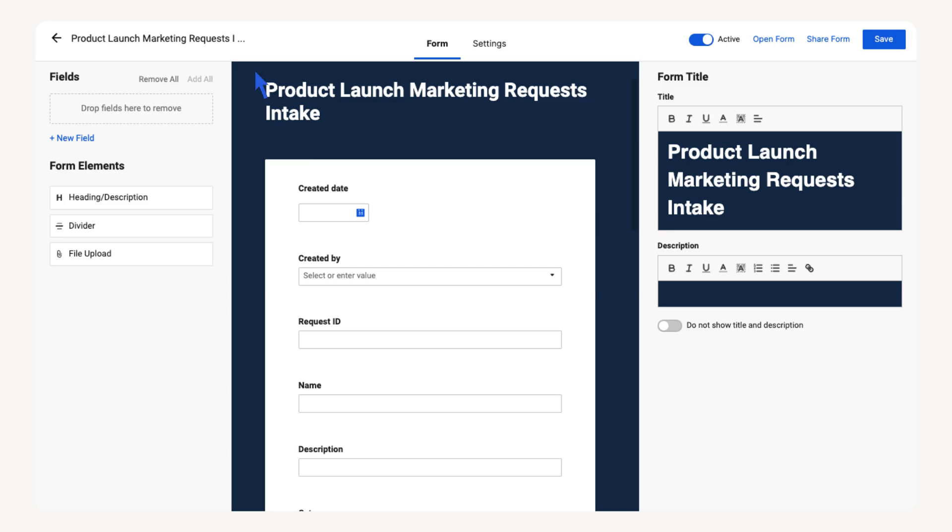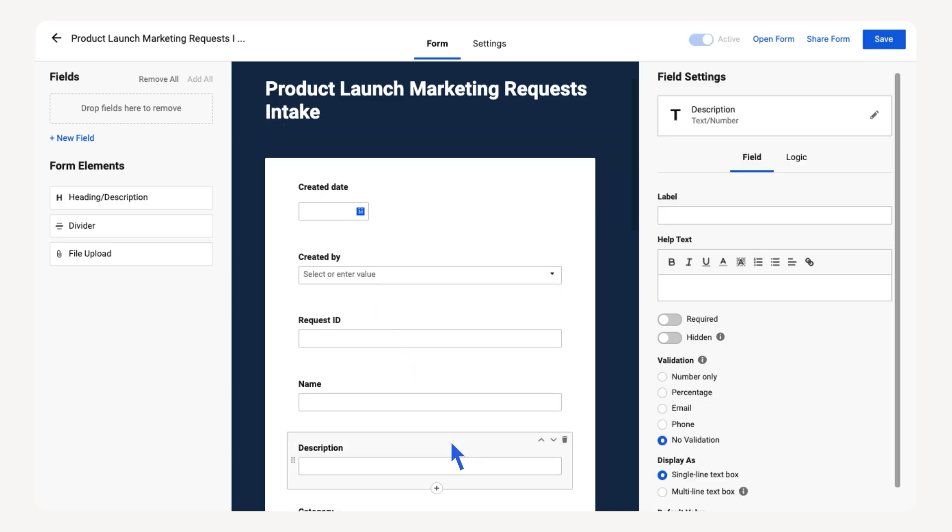Let's make the description field a required field. Select the field. In the field settings, toggle on Required. Now end users have to fill out this field before they can submit the form. If you add a field to the form, the associated column is added to the sheet.